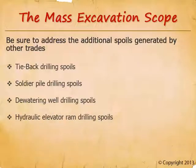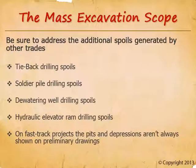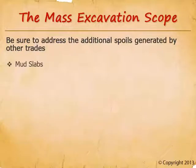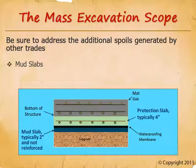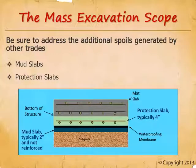Hydraulic elevator ram drilling spoils may be on the architectural and/or vertical transportation drawings, but unless excavation bidders are specifically told otherwise, they're going to assume the elevator subcontractor is off-hauling their own spoils. On fast-track projects, the pits and depressions aren't always shown on preliminary drawings — especially the plumbing pits. Fast-track projects commonly bid the mass excavation trades off very preliminary drawings, so we've got to anticipate those pits and convey their size and locations to the excavation bidders. Mud slabs are used to provide a solid and clean working surface at the base of an excavation, usually about 2 inches thick. These are a means-and-methods of construction, so they won't be on the drawings. Protection slabs are used to provide stable working surfaces over a waterproofing membrane and to protect the membrane — typically about 4 inches thick, and also a means-and-methods item not on the drawings.